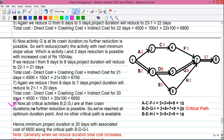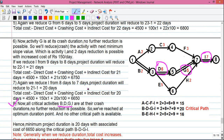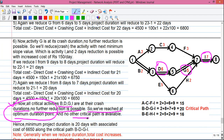Step 8: All critical activities B, D, G, and I are now at their crash durations. Activity D reduced from 8 to 6 days, activity G from 7 to 5 days, and activity I from 9 to 7 days. Since all critical activities are at crash duration, no further reduction is possible. We have reached the optimal duration point, and no other critical path is available — so calculation is complete.